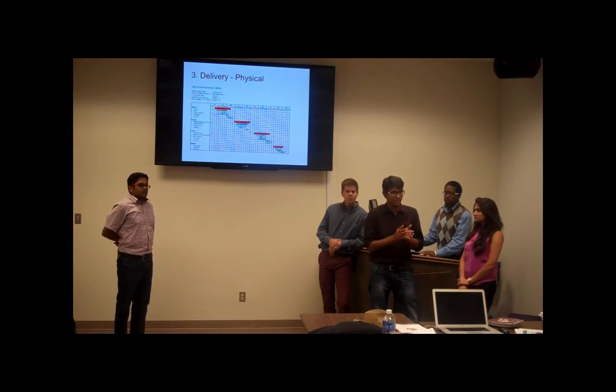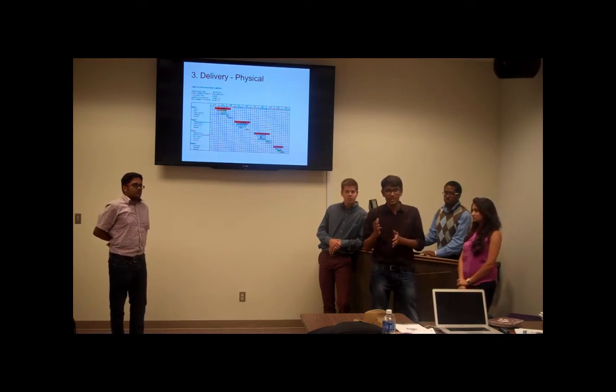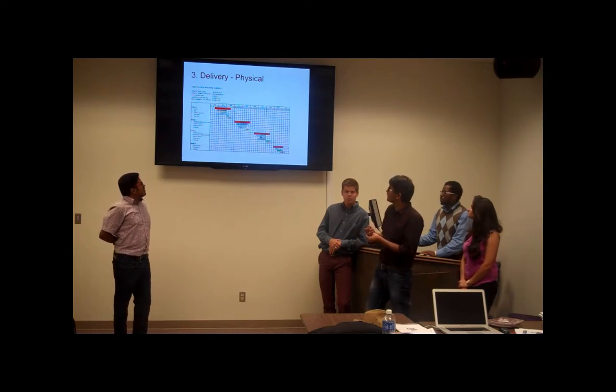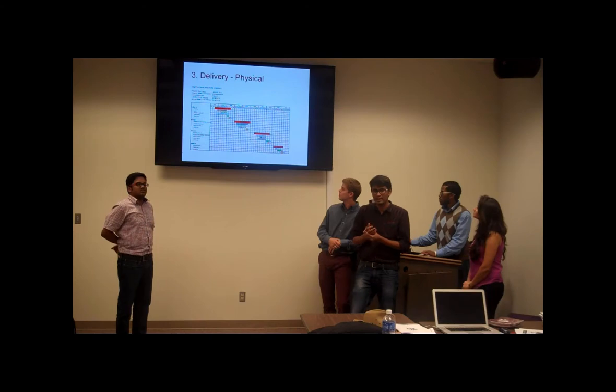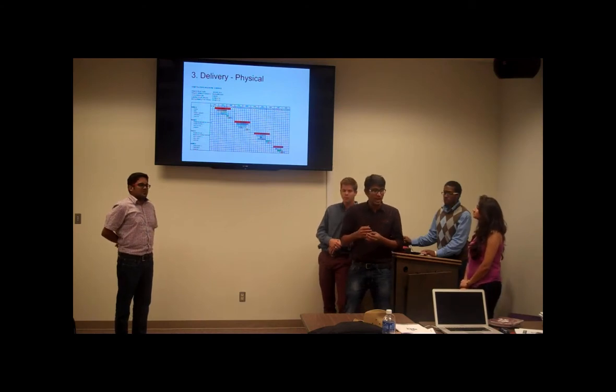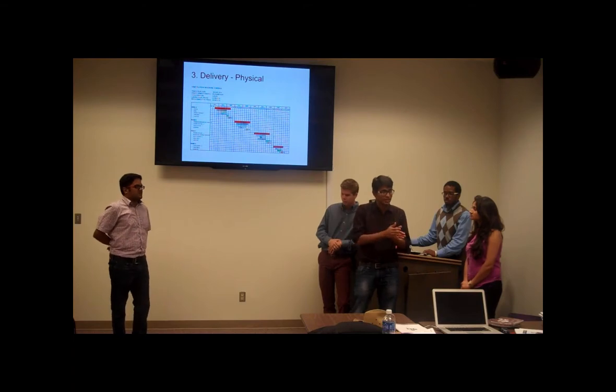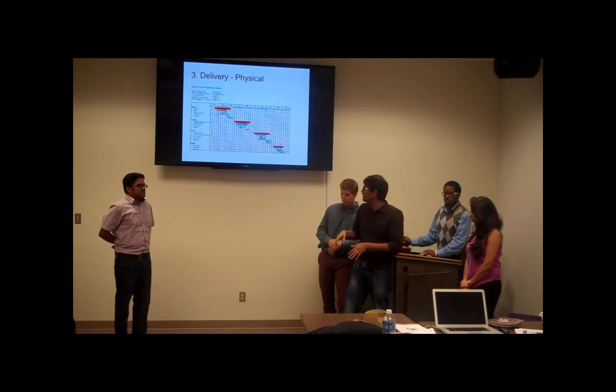We have a non-constructive phase between each phase, so that will help the organization to raise funds for the next phase. So if you can see, above that we did not provide any staff housing in the first phase, and we provided like 7 housing units in the first phase only, so that the staff can stay in the student housing units itself.